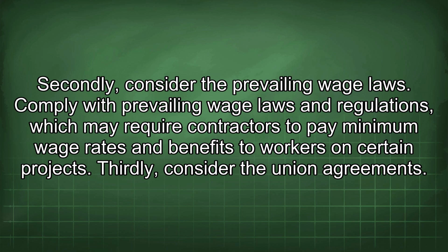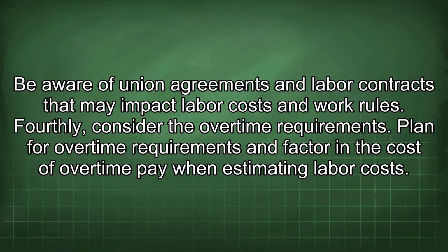Secondly, consider the prevailing wage laws. Comply with prevailing wage laws and regulations which may require contractors to pay minimum wage rates and benefits to workers on certain projects. Thirdly, consider the union agreements. Be aware of union agreements and labor contracts that may impact labor costs and work rules. Fourthly, consider the overtime requirement. Plan for overtime requirements and factor in the cost of overtime pay when estimating labor costs.